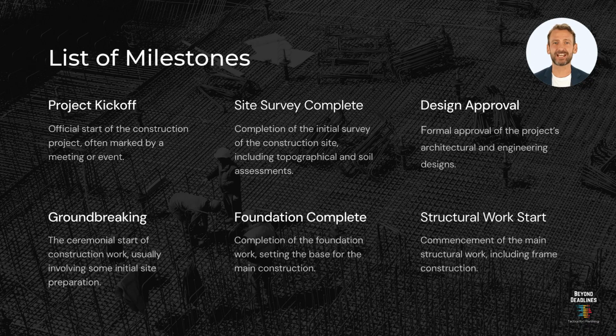Listed below are the standard milestones that are required for the schedule. No need to memorize these. We are going to provide you with everything you need to get started. Notice how these milestones cover key points across the project timeline. This will help with reporting and tracking of the project. If you'd like to add additional milestones, feel free to. If you see a need to change any of these milestones, contact your site scheduler who will help facilitate that change.